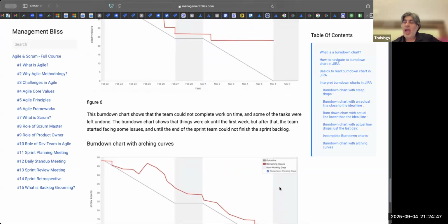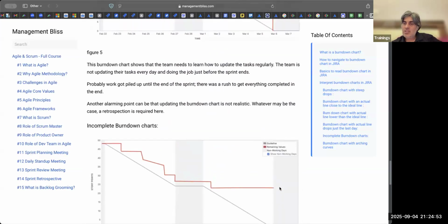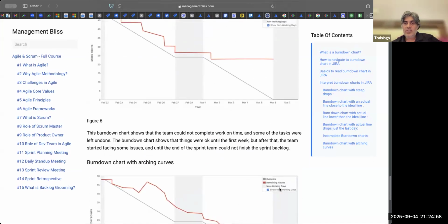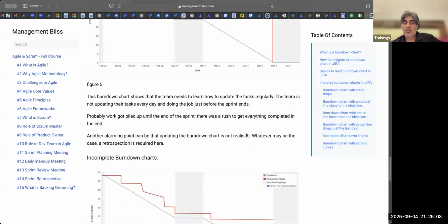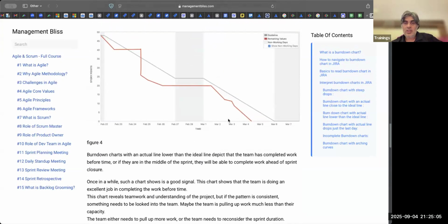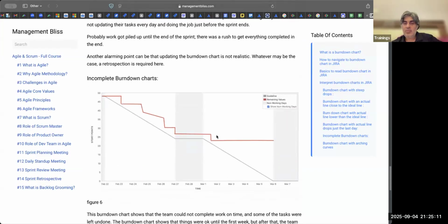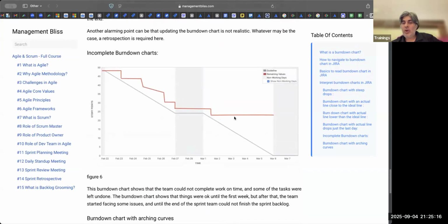One look at this chart and you would know what is happening with the team, whether the team is overestimating or underestimating. In the other case, which was here, it was overestimating the task. In this case, there might be underestimation of the task. Maybe they picked a 20-pointer and this was a 20. There were two 20-pointers, or one 20-pointer and a 3-pointer.